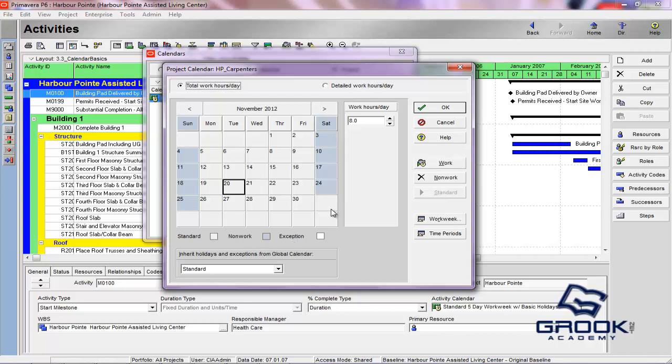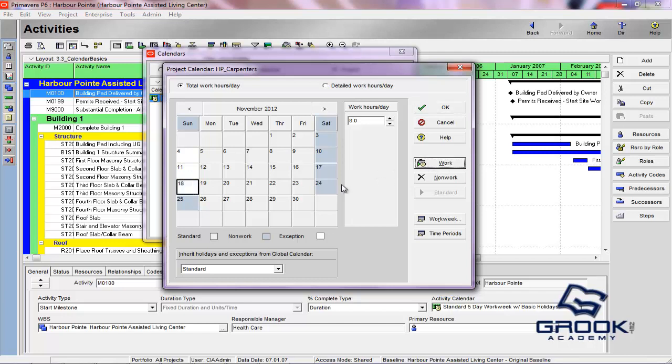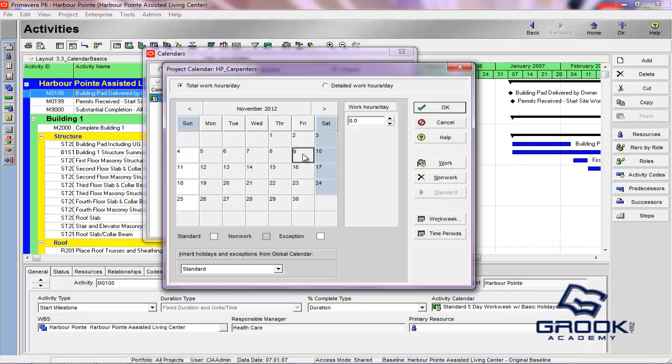So what you basically would do is, with our example with the Carpenters, we said that they don't work on Fridays, but they do work on Sundays. So what we would do is come over here and we would set Sundays as a work day. And you'll see that that's now making all Sundays workable.